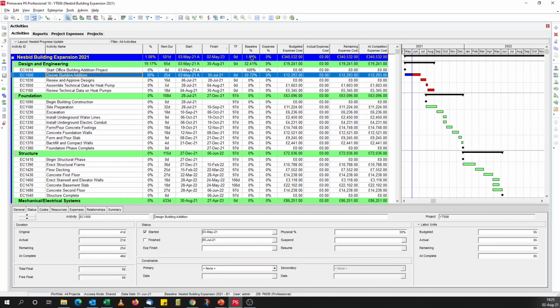So what I'm thinking of doing is create a user-defined field, export the performance percent complete to Excel, copy it from Excel, from the activity tab onto the project cost tab, paste it in that user-defined field, import it back into P6, and use global change to do it.